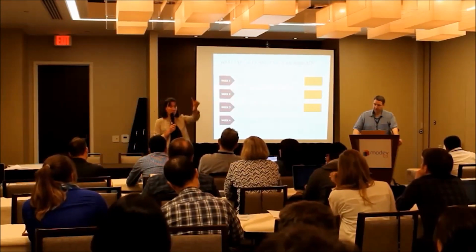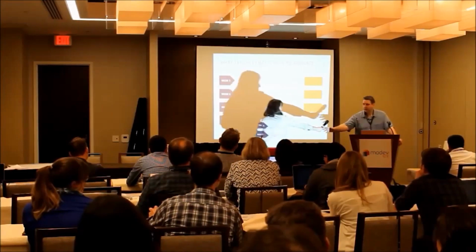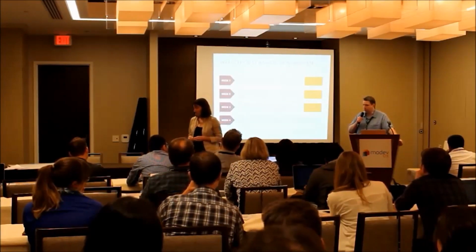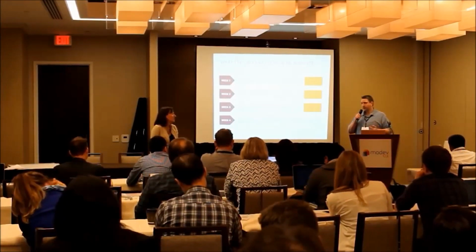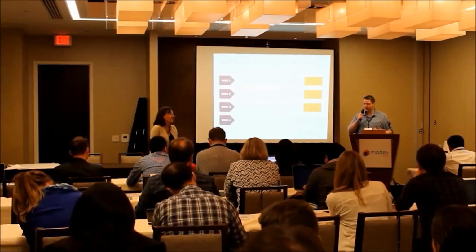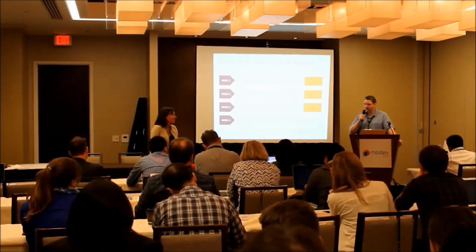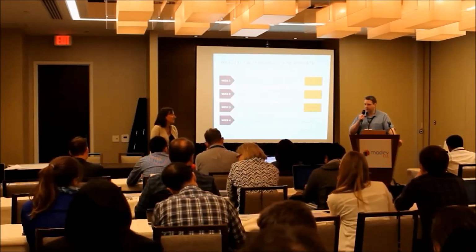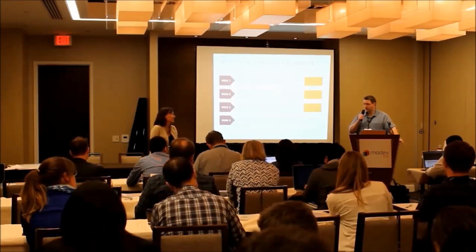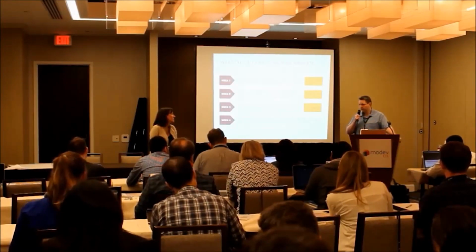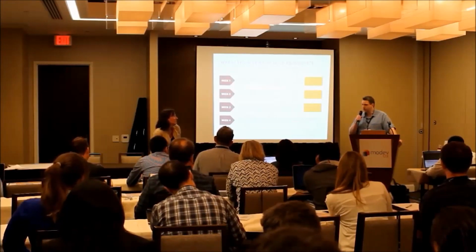But the user stories, rather than being very big, are very shallow and fairly simple. Typically it's 1 sentence, 2 sentences of description. As a developer coming from large corporations where your tickets are so long you have to scroll to see everything, and then there's all the images at the end for acceptance criteria, this is really like 1 or 2 lines and go. Because we're constantly collaborating and talking together, we don't need as much. We need some guide, something in the background for that. As far as user stories go, I'm not as familiar, but Jira in general is very shallow for these type of engagements. Pretty shallow stuff.